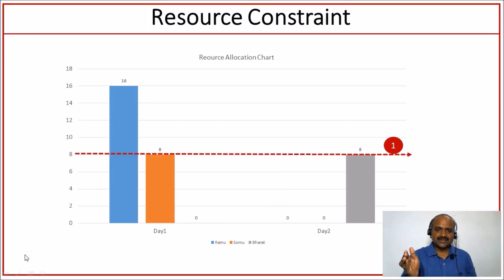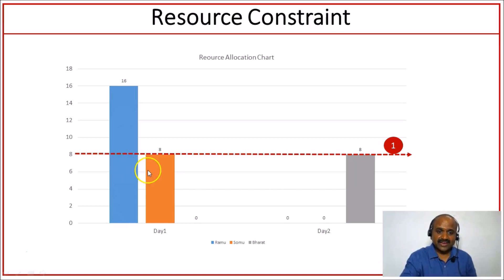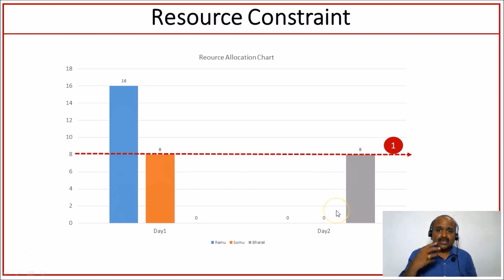We have a resource constraint: no resource should be planned more than eight hours on any given day. On our resource graph, Ramu is over-allocated because he is allocated for 16 hours — more than eight hours — on day one. Somu is allocated for eight hours on day one and Bharat is allocated for eight hours on day two. So to honor this constraint, what is the way out?